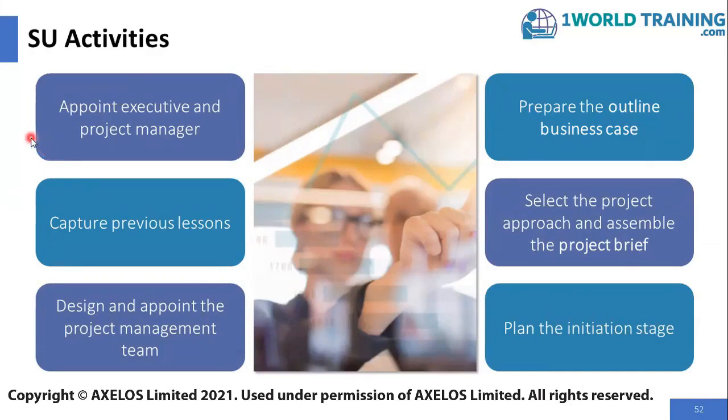Appointing the executive and the project manager, capturing the previous lessons, designing and appointing the project management team, preparing the outline business case, selecting the project approach and assembling the project brief, and planning the initiation stage.